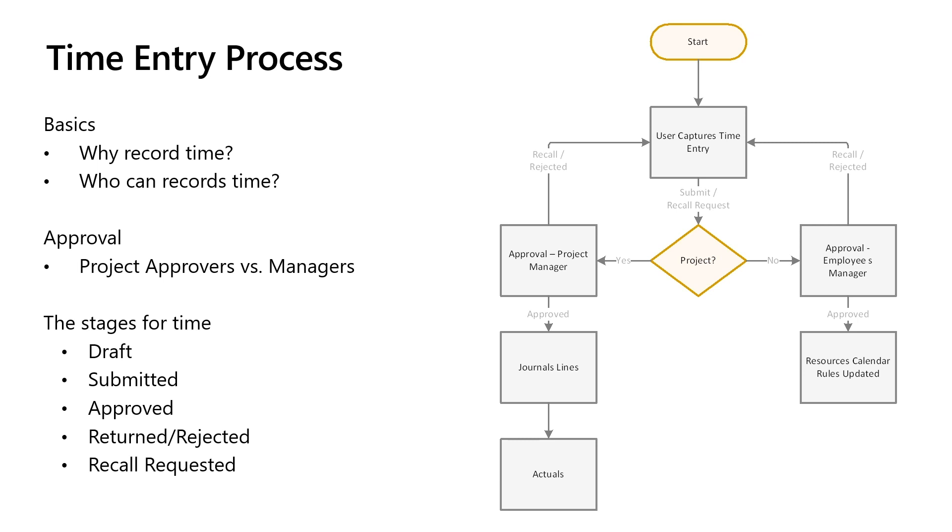However, there are scenarios where when you submit time, you may have made a mistake. Project Operations allows for a recall of a time entry in two stages. You are able to recall a time entry immediately on submission if the approver has not approved it. And you are also allowed to recall a time entry that has been approved. But the result there isn't so much that the approval happens immediately. The approval request gets created and sent through to the approver, who then has the opportunity to review the changes you're making, understand the financial impact, and allow for the transaction to continue or be rejected.